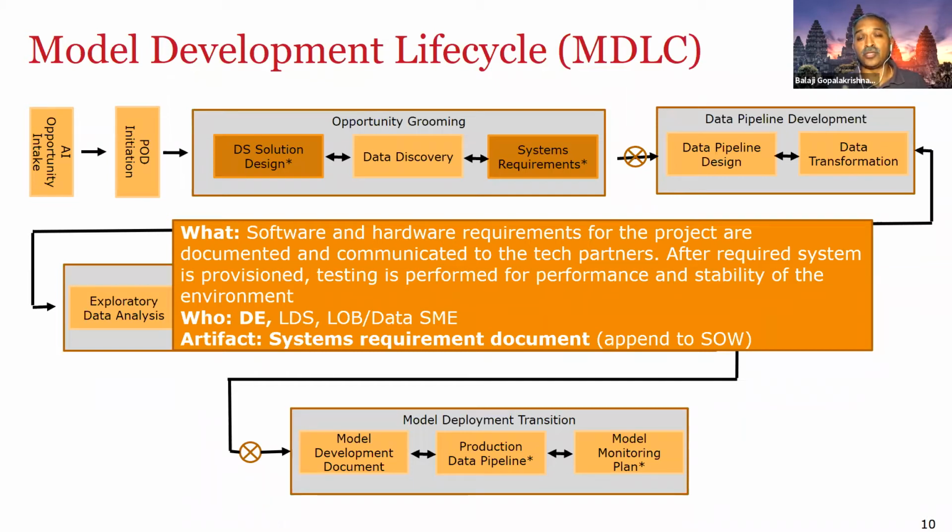And so it's important for you to make it very clear to whoever is the platform administrator that, hey, I need these resources to be able to effectively work on these models, so that those things are secured ahead of time. Otherwise, this can come as a nasty surprise later, that you're trying to build a model and it's taking you 5 hours just to do a single run of training, and you're not going to hit the timelines that you've already committed to around this phase. So it's important to get these things squared off before you get into the actual model development.